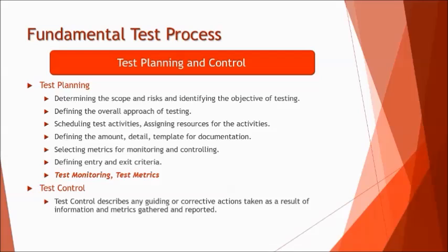We'll talk about the test control here. The test controls are certain actions which are written by the test manager, which basically help to create an alternative or any such kind of corrective action which can be taken if you think the plan is deviating from the schedule or as planned. Usually what happens when you do the planning, it's a very early stage or quite the beginning of the testing life cycle where you do the planning.